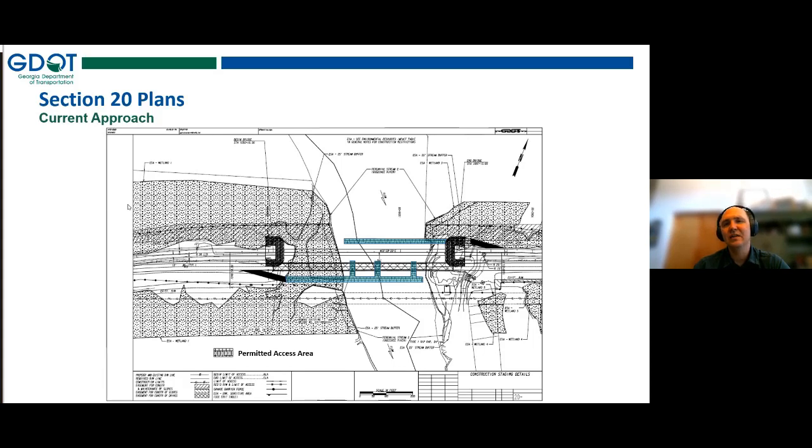about the location. And even during construction, they were coming back and saying, hey, our contractor has a crane with a longer arm than that. We need to push that work bridge out further. And that required us to do an addendum and to potentially re-permit in some cases, depending on the type of structure that we were talking about. So that was our current, or I should say now previous approach. But moving into our new approach, Sam, next slide.